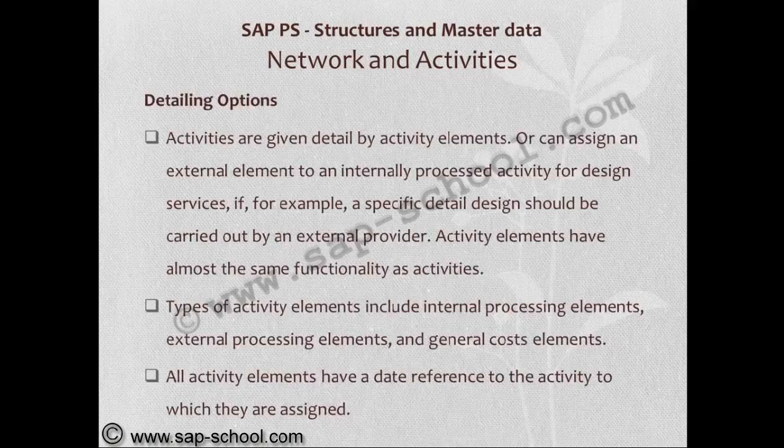Activities are given detail by activity elements, or you can assign an activity element to an internally processed activity for design services. If, for example, a specific detailed design should be carried out by an external provider. Activity elements have almost the same functionality as activities. Types of activity elements include internal processing elements, external processing elements, and general cost elements. All activity elements have a date reference to the activity to which they are assigned.